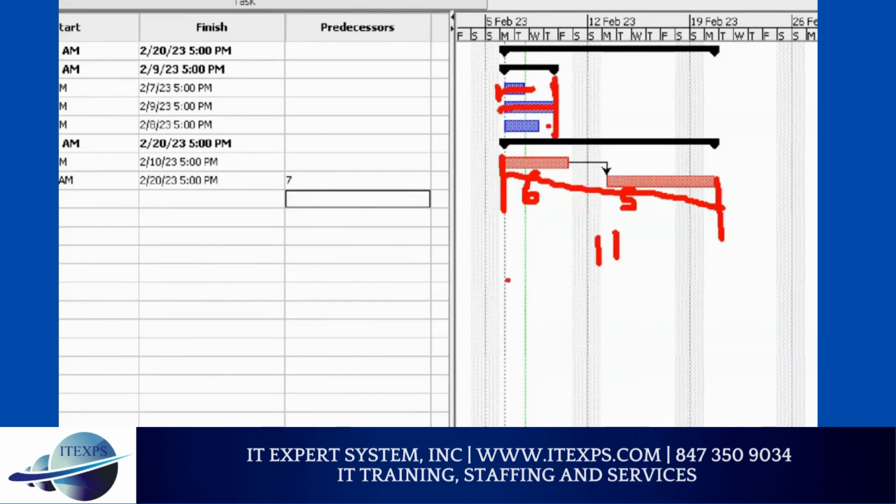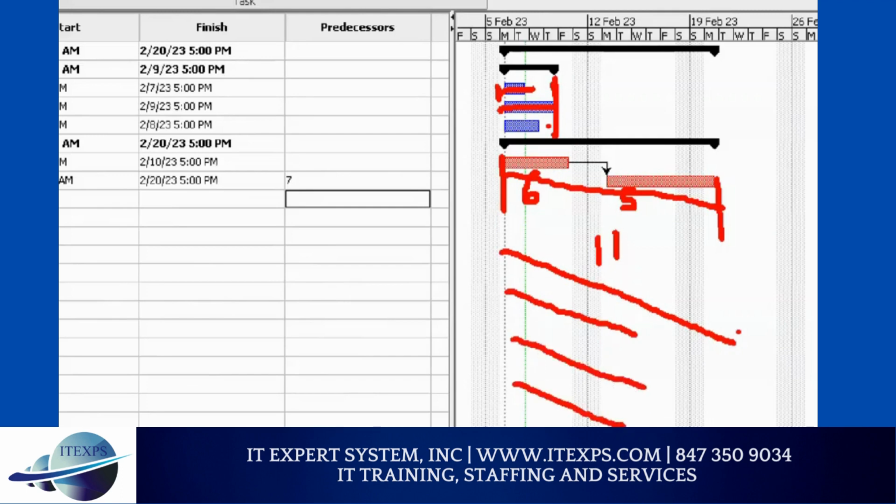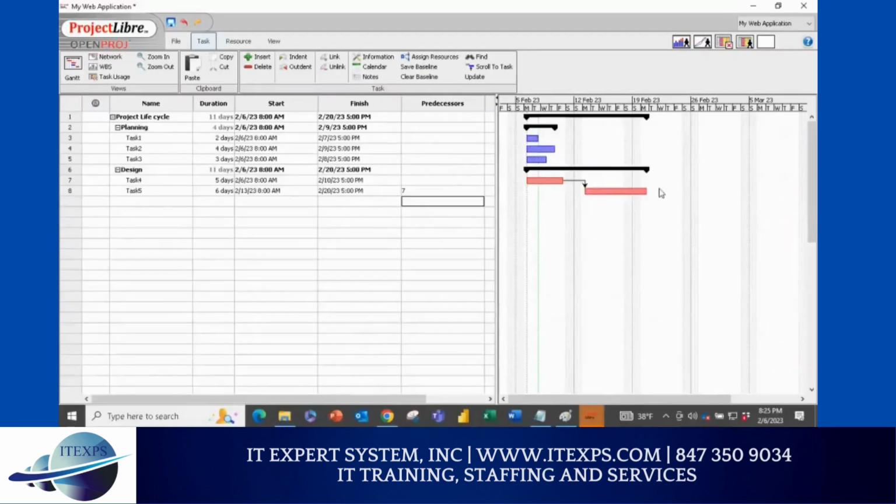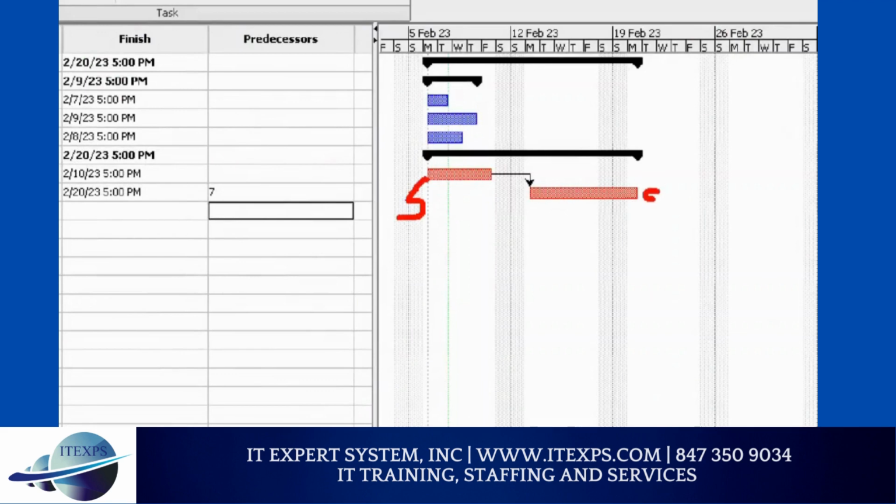So you have to create calculations. And if your calculation's number is highest, that activity path will become the critical path. Remember these are durations. So longest duration, 5 plus 6, 11. Longest duration and shortest path from start to end. That's called the critical path. Why is it the shortest path? Because if you walk through here, you will reach the end. If you walk here, you will not reach the end. So that's why longest duration, but shortest path to reach the end.